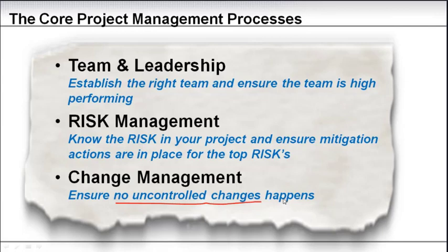If you don't have a process in place for documenting and managing your changes, you will also have a very hard time, because you will most likely get into a scope creep situation where your scope just keeps changing or keeps expanding. So change management needs to be in place. And here I want to stress that changes are not necessarily bad. A change request is not necessarily bad, and it doesn't necessarily mean that you will have to pay extra. It doesn't necessarily have a cost. We'll get to that more when we get into the change management or the scope management process later on.